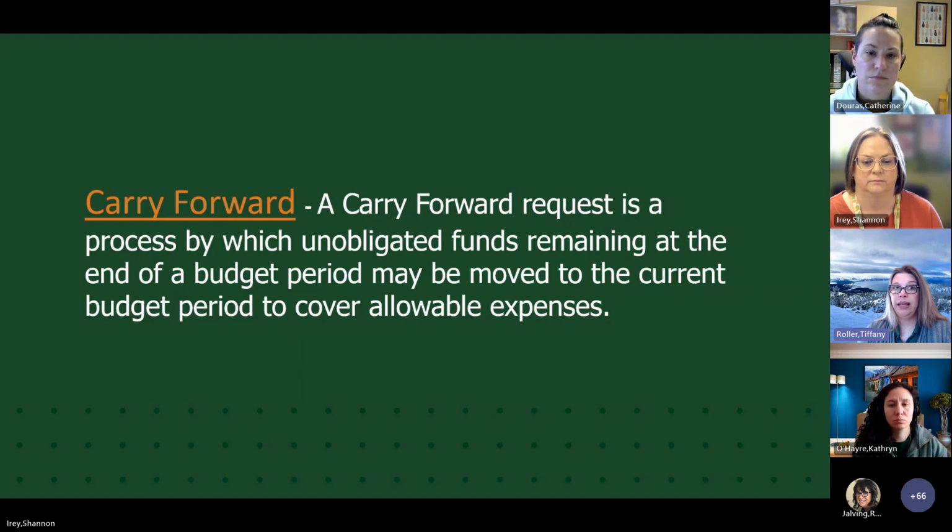So a couple of examples of that where SP is going to be on alert to make sure is NASA, Department of Energy. Department of Energy specifically will often have what we call go, no-go milestones built into the award, where there might be particular stop dates in the award where the grants management specialist or the program officer over on the sponsor side wants to see what kind of progress is taking place, or they might have other kinds of checklist items that they want to make sure are in place before they authorize carry forward or they authorize that next budget period.